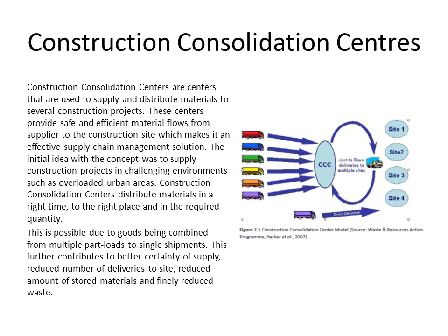You can call them CCCs, RDCs, but it means each building site won't get several vehicles, and if Bovis control rather than outsource this logistics, they will have complete control as to when they deliver and how they deliver. You could say that's a lean concept because they're pulling just in time, so it fits in with a lean supply chain. It reduces waste, it reduces transport, it reduces costs, etc. There's a lot to be said for that suggestion.